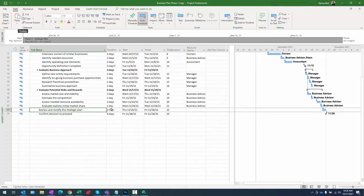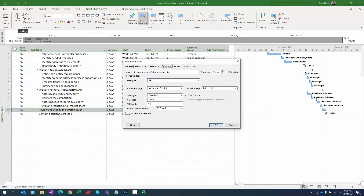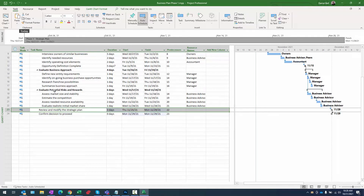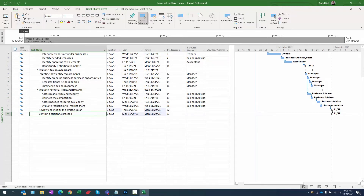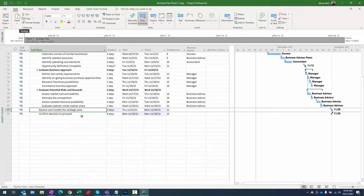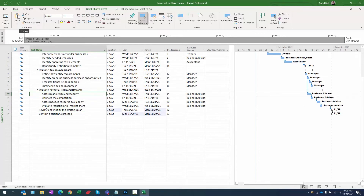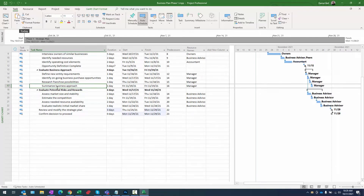Back in the main project, 'review and modify strategic plan' can actually be a milestone with a duration. With the task selected, go to task ribbon, properties section, information, advanced tab. It has a two-day duration — we'll extend it to three days since we have input coming from an external vendor — then mark it as a milestone. That milestone represents the culmination of this set of tasks; the confirmed decision to proceed is based on the entire phase.